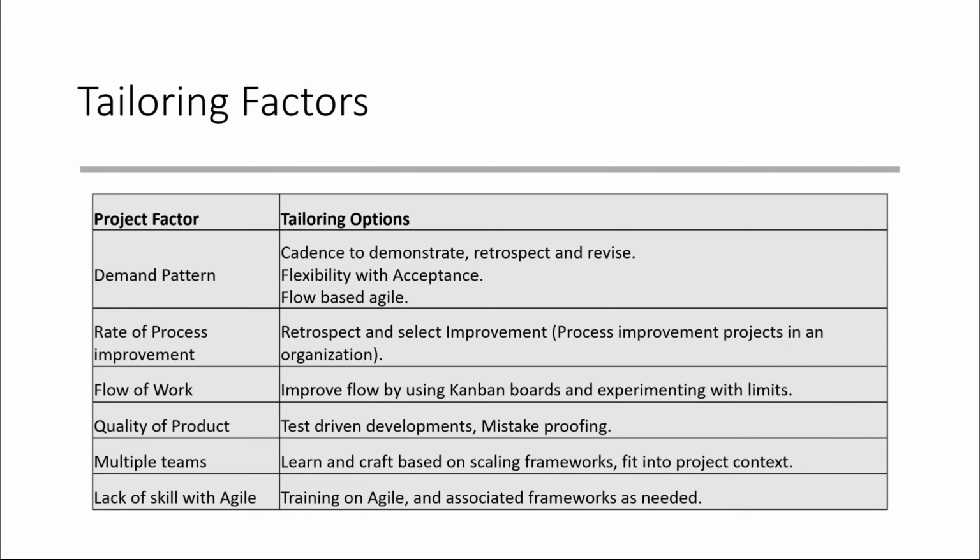A Kanban board helps the team to further improve its effectiveness by visualizing the flow of work, making impediments easily visible, and allowing flow to be managed by adjusting work in process limits. In addition, extreme programming inspired engineering practices such as use of story cards, continuous integration, refactoring, automated testing, and test-driven development further increase the effectiveness of the Agile team. In summary, the blend of practices from these various sources produces a synergistic result of higher performance than each individual component in isolation.